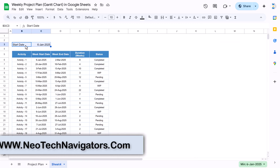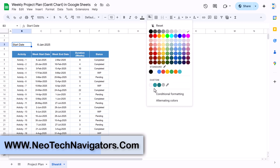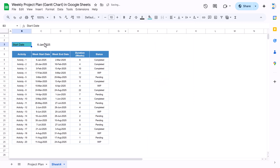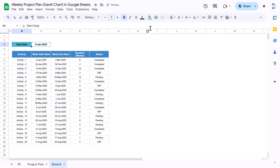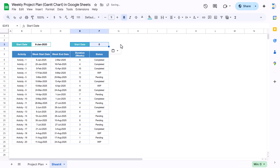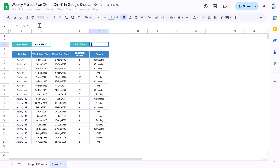Now let's select the start date range and apply formatting — choose a background color, select the two header cells, make them bold and slightly smaller, align center and middle, and add a border with the same color. Make a copy and paste it for the end date section. For the project end date, use the MAX function taking the maximum of all the end dates — that gives us the project end date.